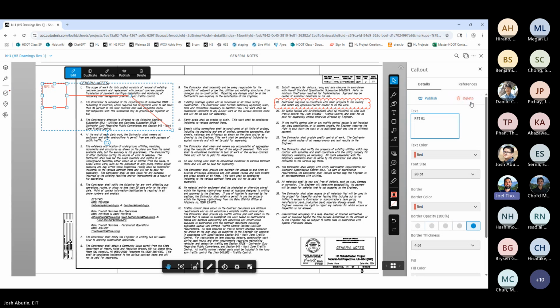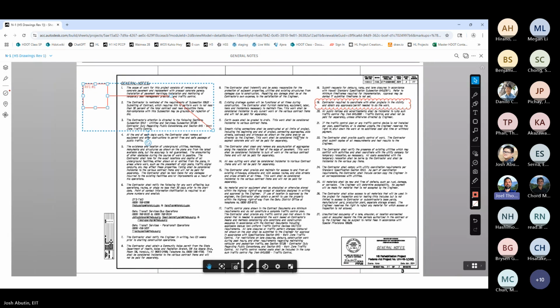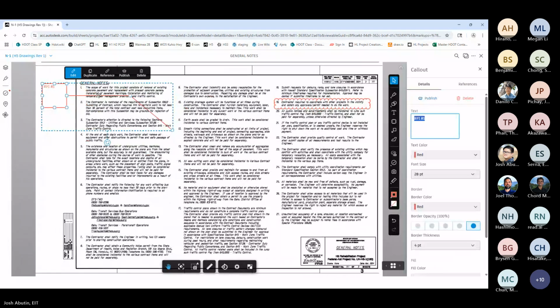And then in theory, the contractor would take that information and apply it to their version of the as-builts, which, like Josh said, we're still trying to iron out those details. But I think the best way is to just have a bridged project. So the contractor has their as-builts in a bridged project, and they're applying their changes, and then they can reference ours and say, oh, it looks like the inspector added this, so we need to add it to our working as-builts. Because at the end of the day, their as-builts are what gets turned in to design, saying, this is what we built.